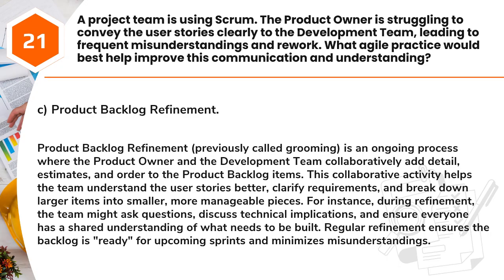Answer: C. Product backlog refinement. Product backlog refinement, previously called grooming, is an ongoing process where the product owner and the development team collaboratively add detail, estimates, and order to the product backlog items.